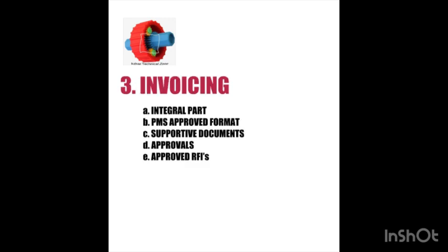Now coming to invoicing. What is invoicing? Invoicing is a very integral part of the project. Now is the time to get the money for whatever you have done, and our salary will be received based on this invoicing. The achieved progress will be claimed at the end of the month, which means at the end of the month we claim the amount for what we have done. The approved progress measurement sheet format has to be maintained properly to claim the progress.